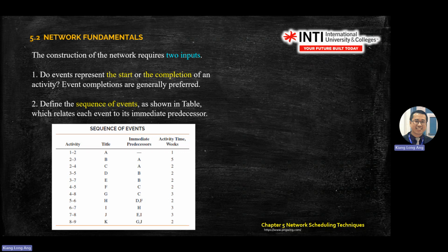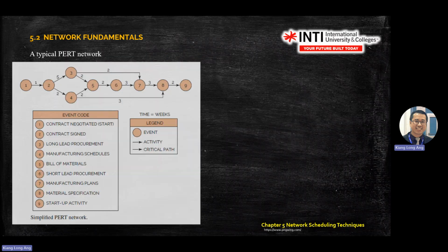In our previous class, we also went through a way to calculate by statistical method, and then you do hypothesis testing, whether you can achieve it or not, and how many percent you can achieve. So this is a mean time. And if the table gives you three numbers, it means optimistic time, pessimistic time, and most probable time: the A, B, and M numbers. This is very typical, as you've seen in the previous lecture, from one station to another station.